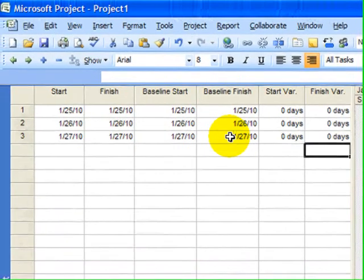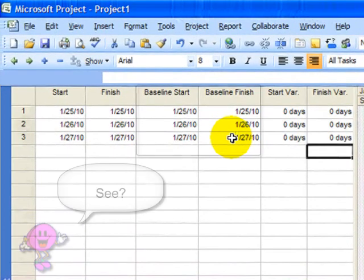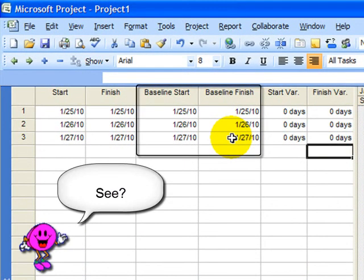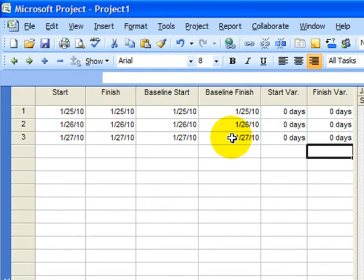Once I've done that, now I have effectively preserved the original plan. And when time comes to begin tracking the project and put in actual starts and actual finishes, then the Variance table will calculate any differences.